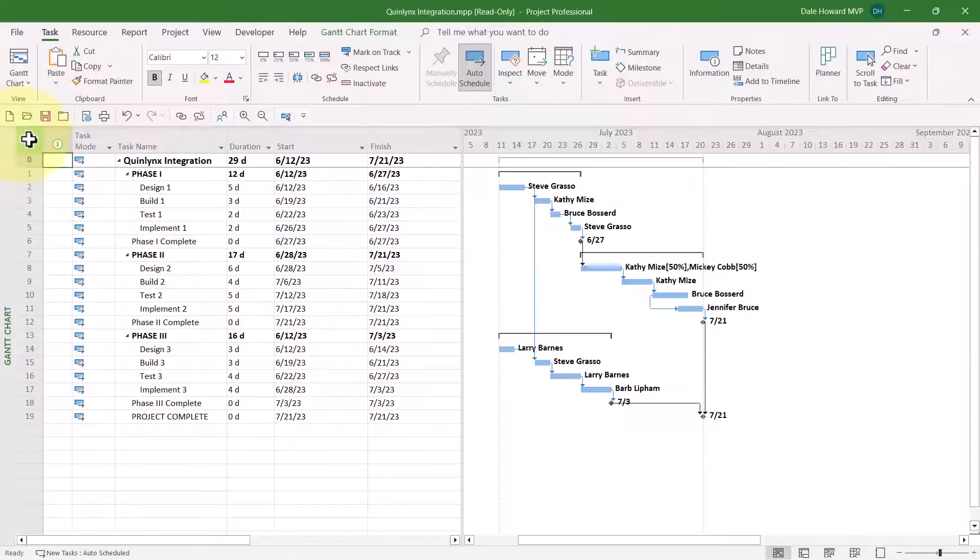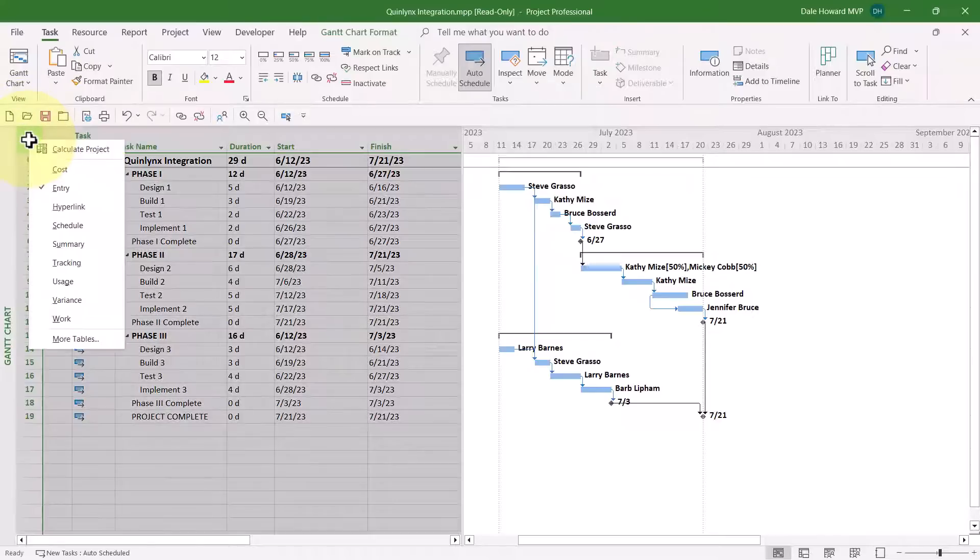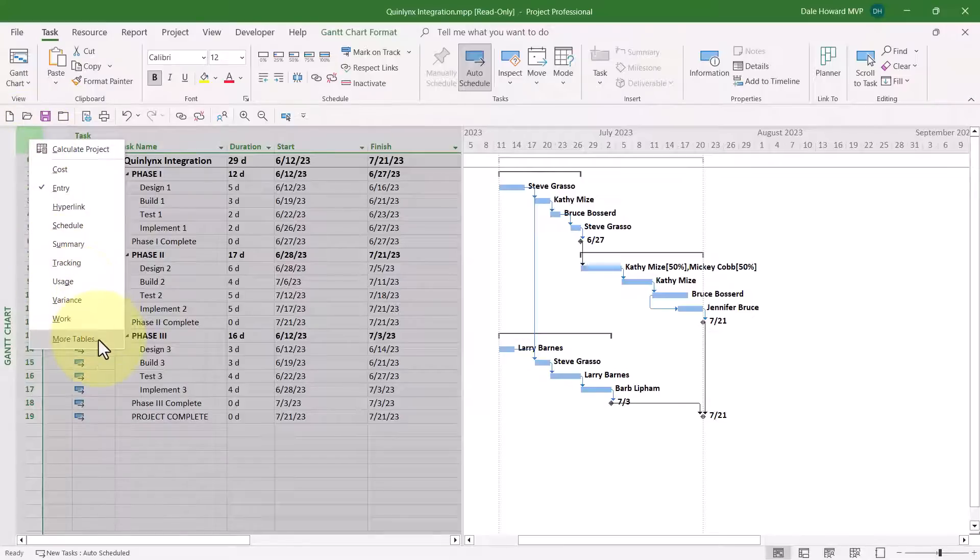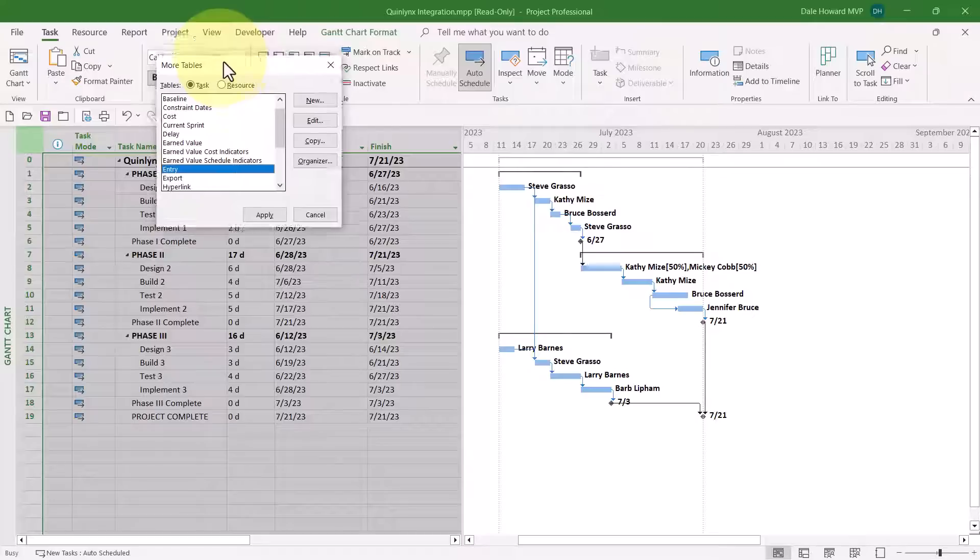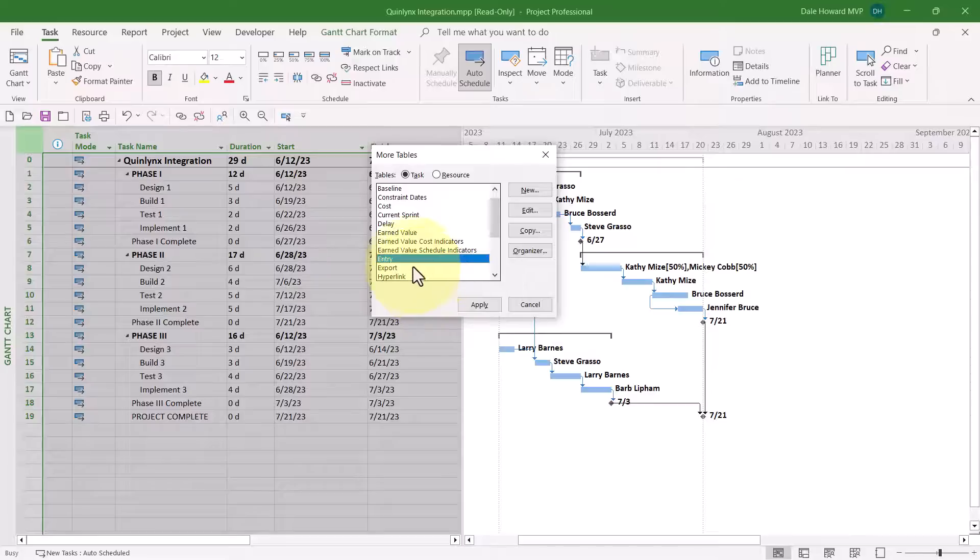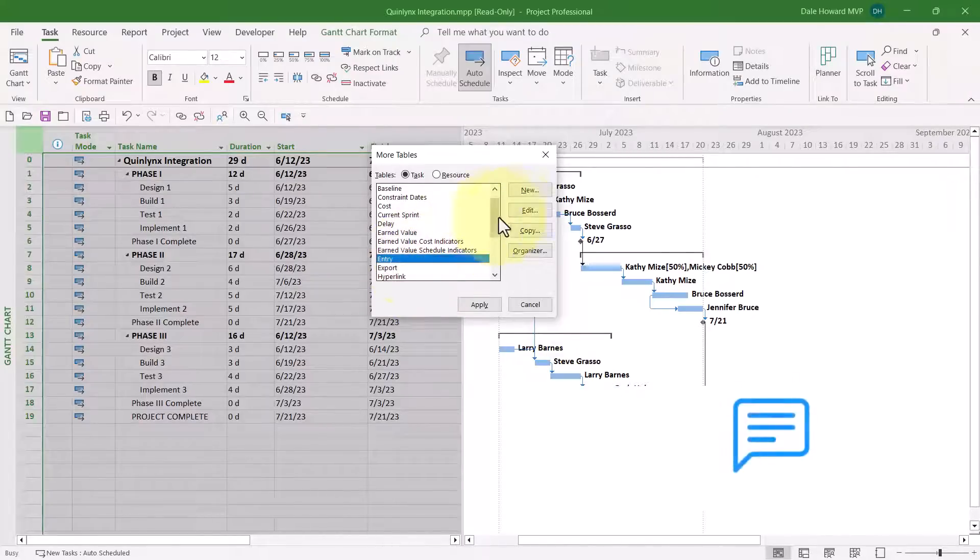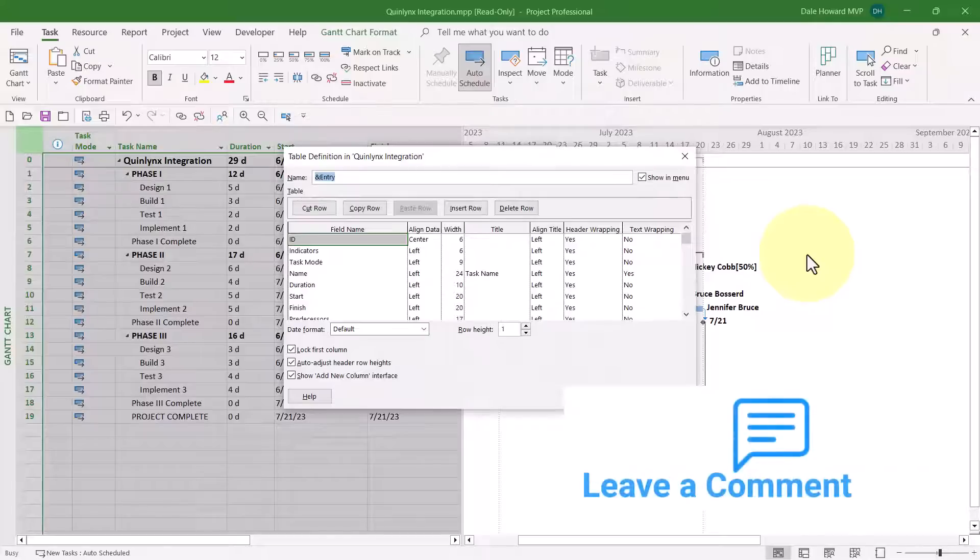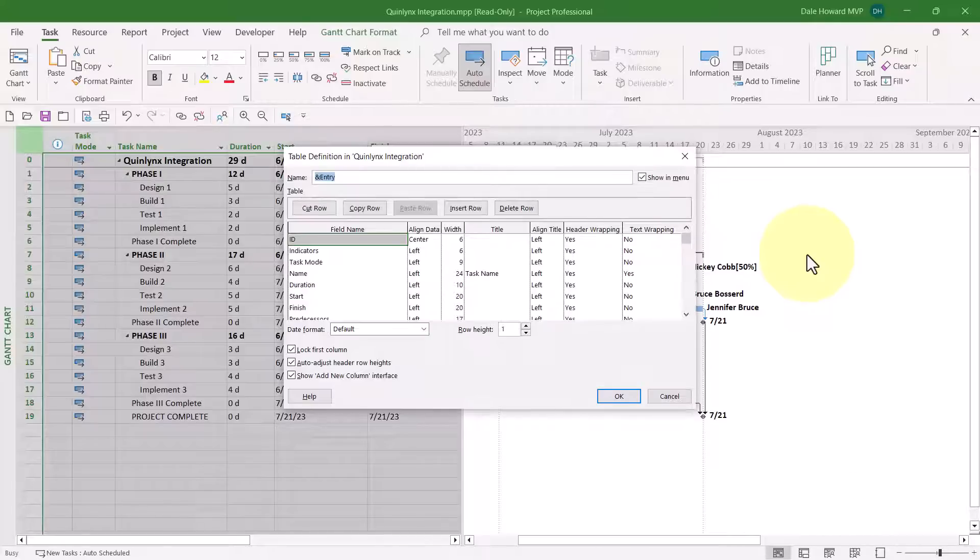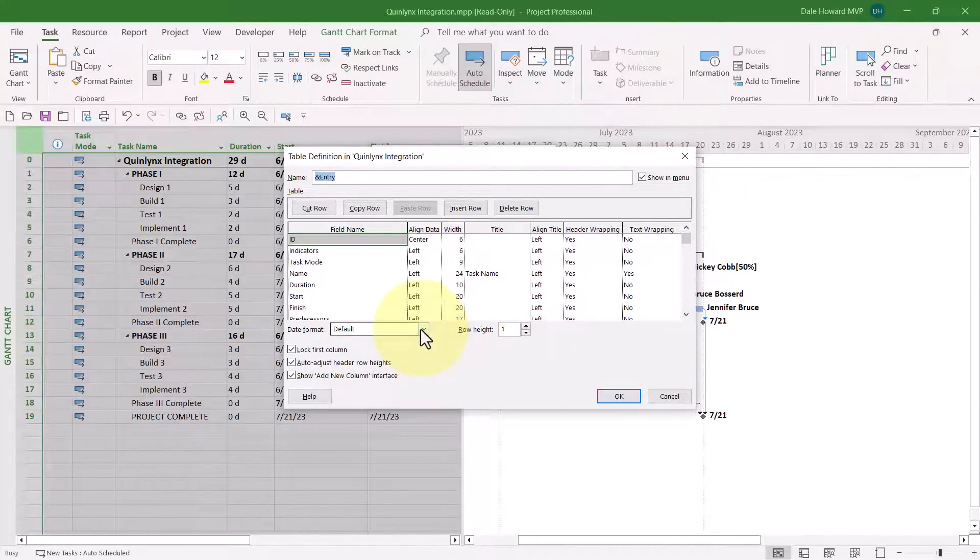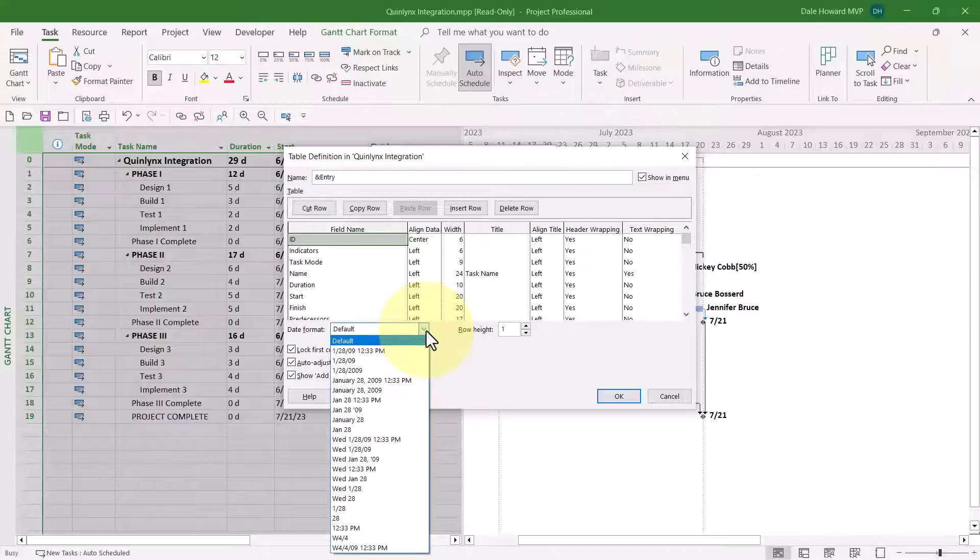Right mouse click on the Select All button. Remember, that's the blank button immediately above the Row Zero ID number. And then choose the More Tables item on the shortcut menu. In the More Tables dialog, leave the Entry table selected, and then click the Edit button. In the Table Definition dialog, there's an option down at the bottom that most people have probably never noticed. It's the Date Format option. This is the Date Format specifically for this table.